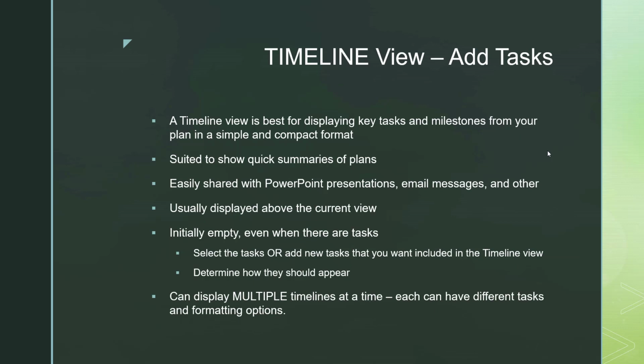And it's usually displayed above the current view. And normally the timeline view is empty. You would have to add a task that's already existing and pull it up to the timeline, or from the timeline you could just add new tasks, right? And then you determine how they're going to appear.